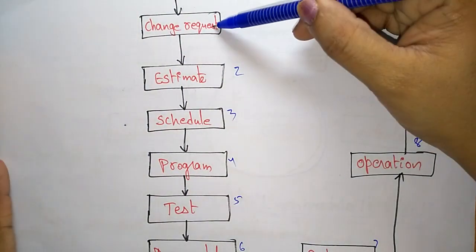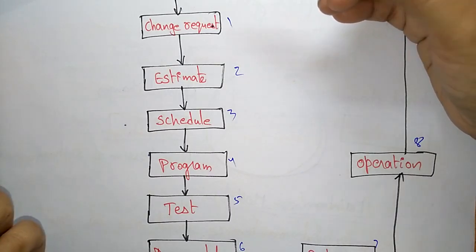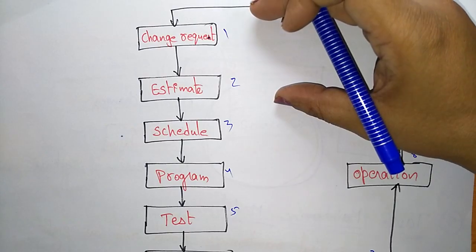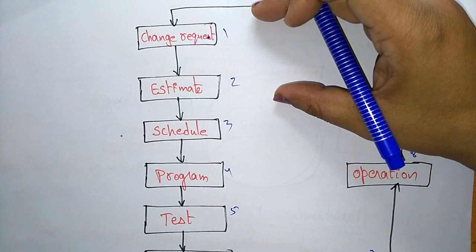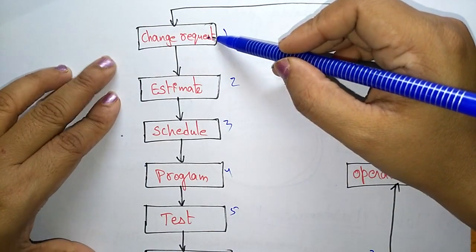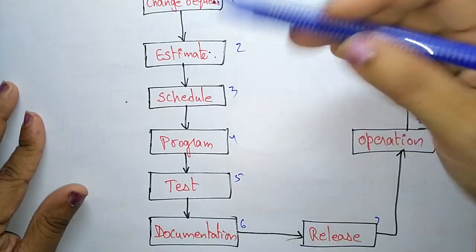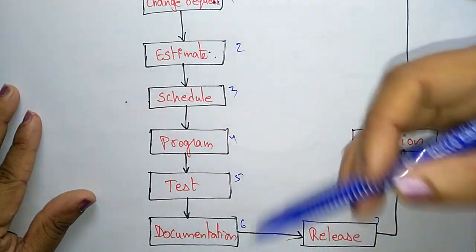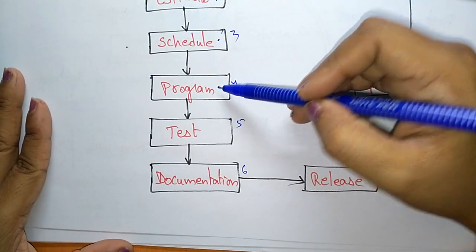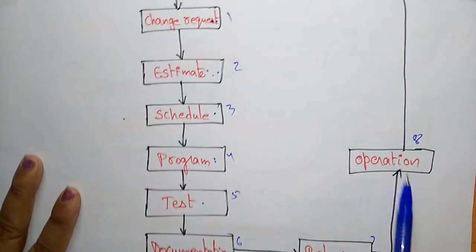Phase one is the change request — maintenance starts with the change request because the change has to be done on the already delivered, existing system. First, start with the change request; then estimate how long it takes and what the cost will be; then schedule; then program implementation; after implementation, test; then final documentation; then release and execute for operation.